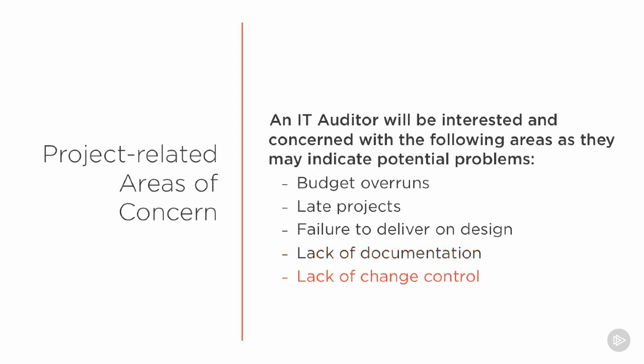The other area is properly controlled change. We should have a change control process in place to manage change — to make sure that as we make changes to a project, all of those changes have been documented and approved. As part of that approval, we must understand the impact of the change on budget and scope, and also review whether the change could impact the security of the systems, ensuring we understand the full impact of those changes.